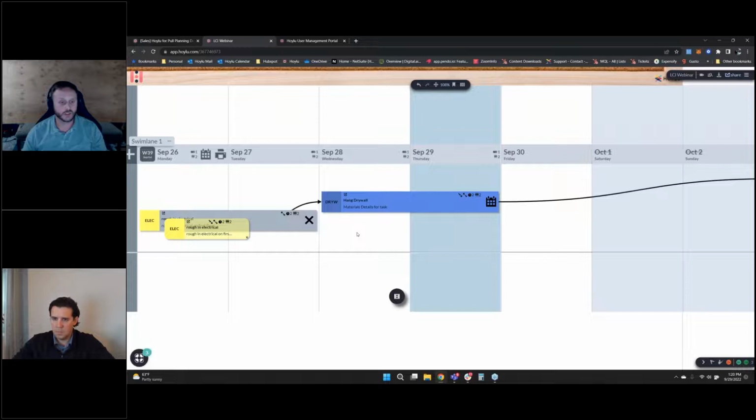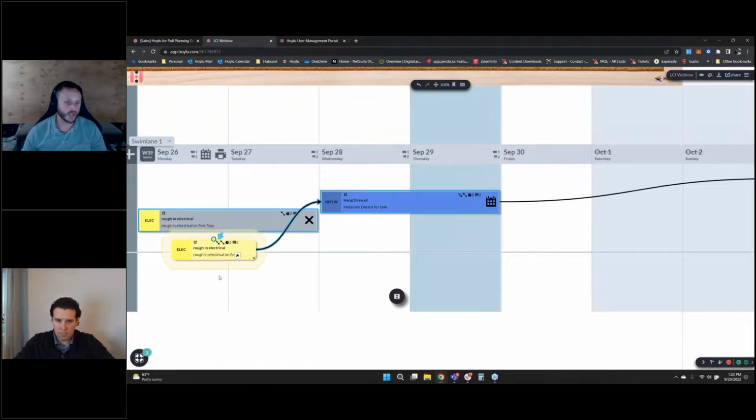And so the other thing you'll notice is we don't actually force you to move that ticket that was marked as incomplete. We just mark it with an X, and we want to have a record of what went wrong and why, and when it was originally planned for. What we do is we take a duplicate of that original task, and you can see the dotted line back to the original, so you can go in and replan it. And so that's what we're going to do.